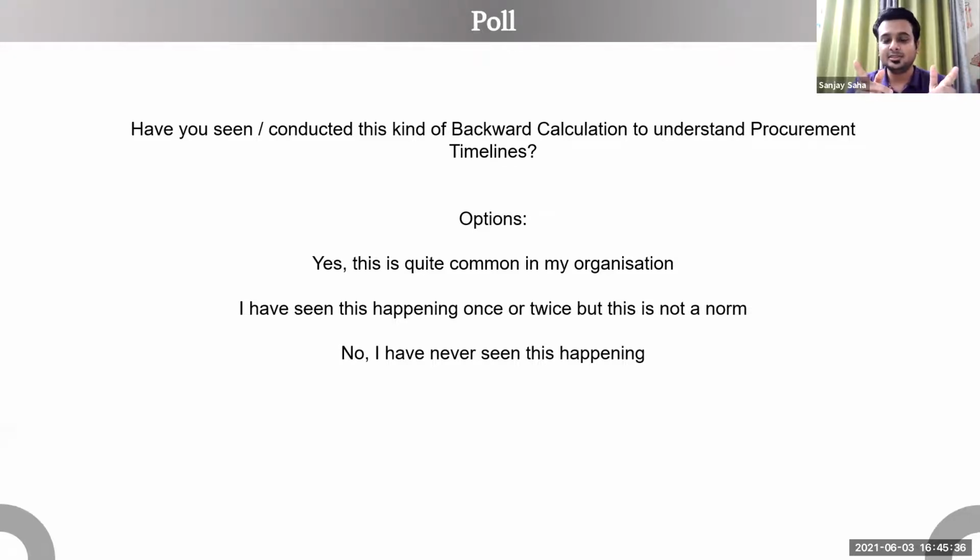So what needs to be done is that if we have a procurement plan in place and we know that the supplies are going to come, people in the contracts department or the procurement department need to find out the latest norms and guidelines of customs clearance, fill up those forms and find all those certificates and documentation beforehand, even before the shipment has landed. And that, my friend, I can tell you, 9 out of 10 times is not done.